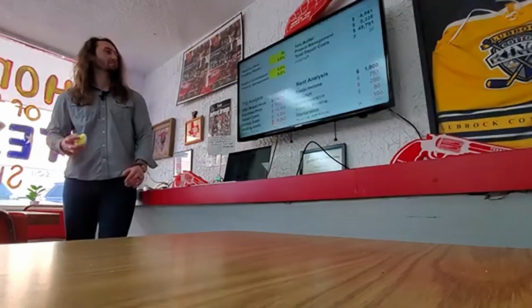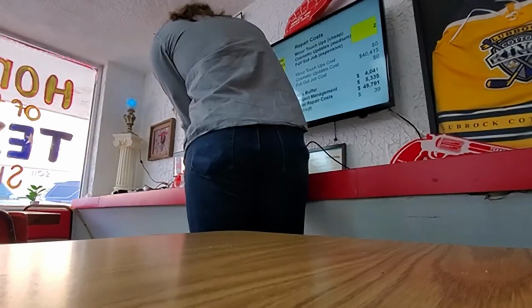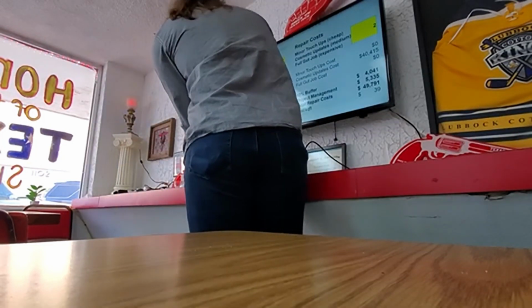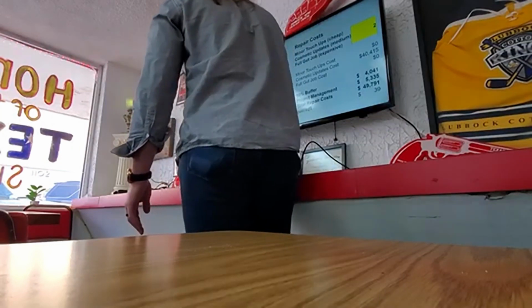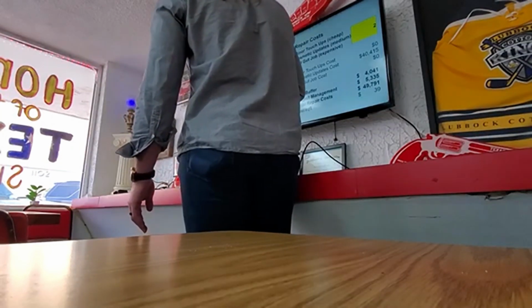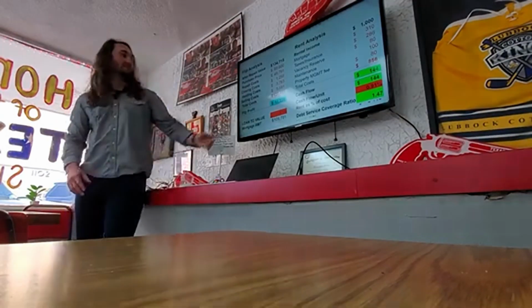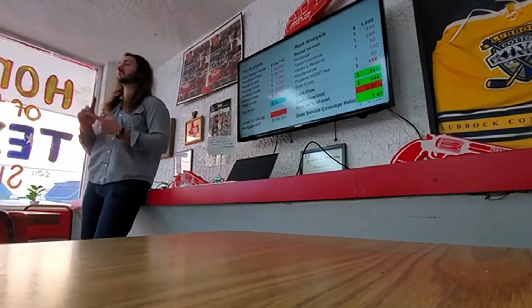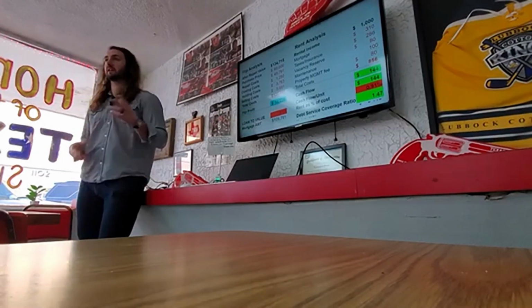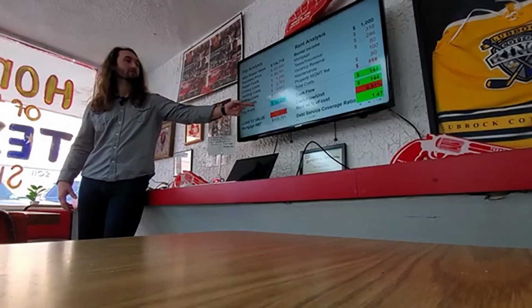Now, let's say I was someone that used my own cash, no lender's points, 0.1% interest. Let's say I'm a realtor, so I'm only going to have to pay 3% commission. And let's just look at those two changes. With those two changes, all of a sudden this one makes a $14,000 profit as a flip. So just those two things, using your own cash, being a realtor, saving a little bit of realtor's fees, this deal that wasn't good turns into a profitable deal.